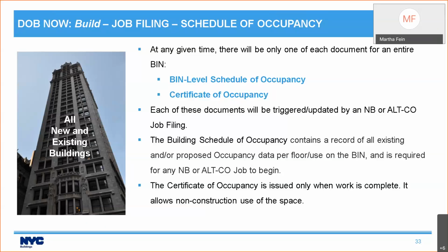All right. So we'll see the results in just a minute. And it looks again like the vast majority of you understood this. It is true. If you are the first person entering occupancy details for a building, you must provide occupancy details for the entire building, even if you're not doing work.